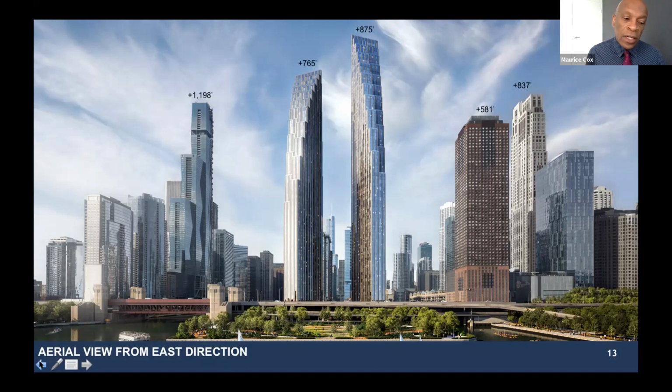Now, of course, that is subject to the council's approval, and that hasn't happened yet. The planned development statement says that the developer will contribute 10 million, but that won't happen until they draw the foundation permits. So the question is, how do we get into the public record that the planning department intends to submit the open space impact fees as an ordinance to the council in July, so that it will allow the park district to begin the design and community process, so that this park can get started this year?